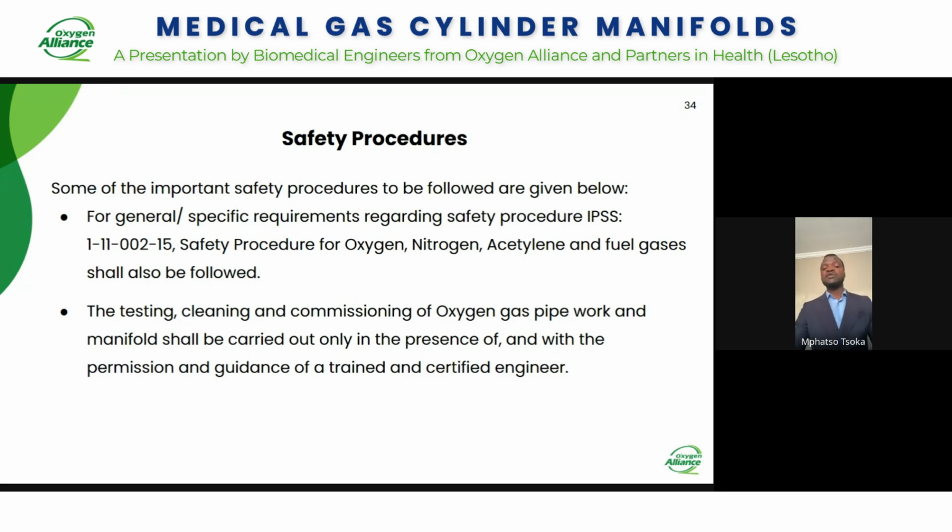be followed. And there are a number of guidelines that can be found and downloaded, whether from WHO or from manufacturers of a certain product, that can be followed to ensure that the work being done or the system being used is certified and permitted for patient use in a health setting. The testing, cleaning and commissioning of oxygen gas pipe work, whether it's a manifold, shall be carried out only in the presence of, or with the permission and guidance of, a trained and certified engineer.